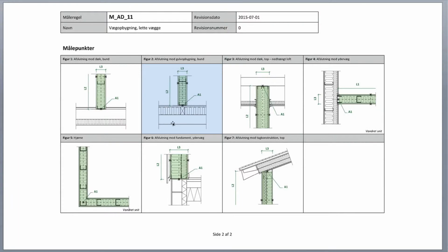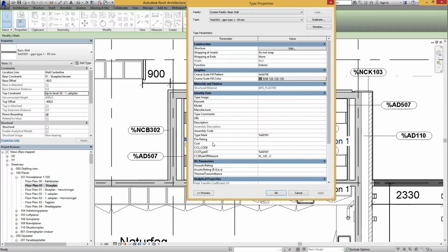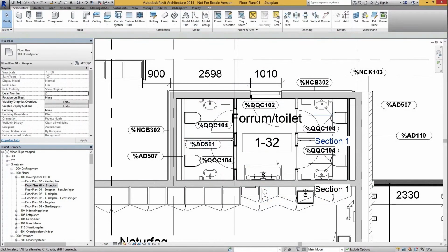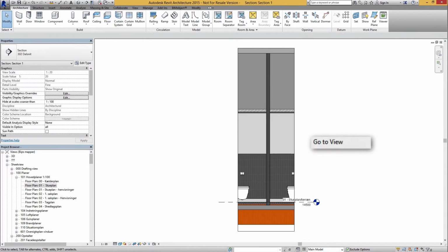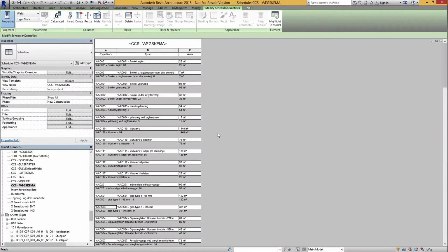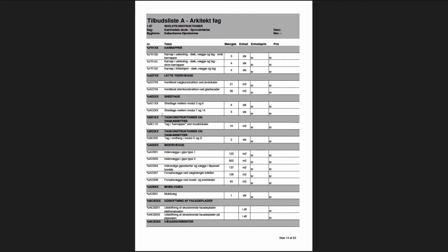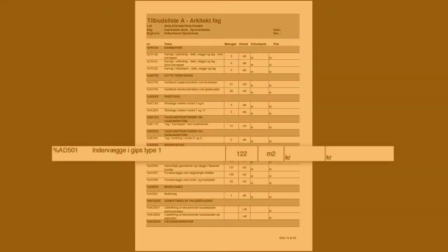When using these methods and details, WW could thoroughly go through the model and verify that it was built just as the measurement rules specified and that therefore the amounts were correct. This led to the fact that a number of errors and inaccuracies could quickly be identified, and at the same time, the model was quality assured and harmonized. Now the tallied quantities could be extracted from the building modeling software, and being consistent with the measurement rules, they could be transferred to the bill of quantities.